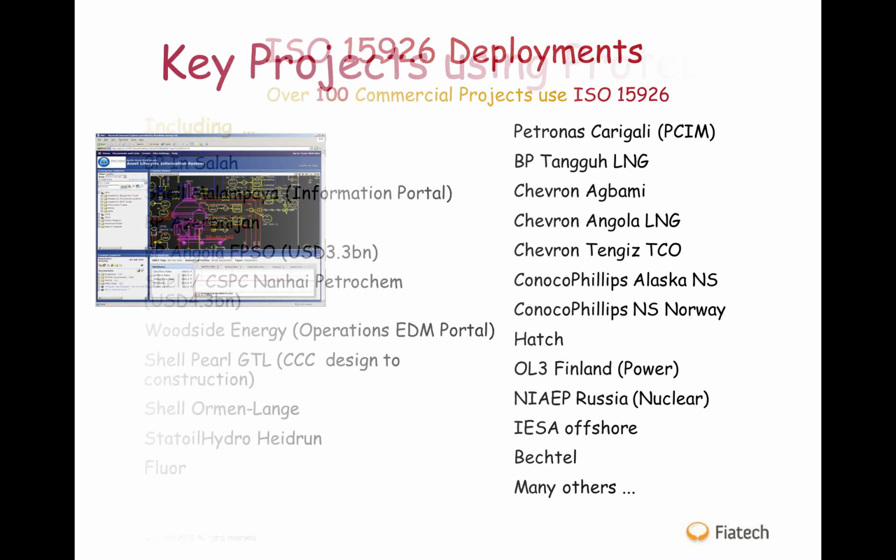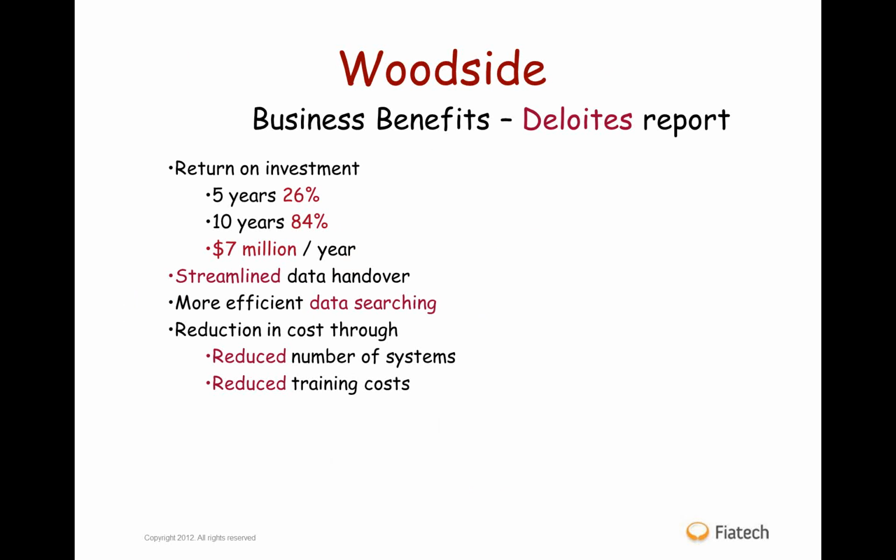And of those, very few have actually given back any detailed analysis, but one for Woodside was a report generated by Deloitte to say their return on investment is approximately 7 million a year, and most of that is coming from streamlining of the data handover, reducing the number of systems and therefore the actual training costs that they're using on their projects. And so return on investment after 10 years, I reckon, is going to be 84%. It's a rather accurate number, and we shall see what happens later.